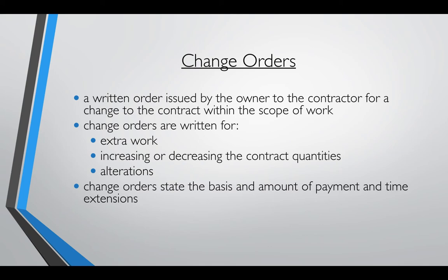And your textbook on 389 says a change order is an adjustment to contract amount and/or contract duration approved, accepted, and signed by the owner, architect, and contractor. And on page 390, under the change order process, a change order can be defined as a specific document signed by the contractor and owner that authorizes addition, deletion, or revision in the scope of work.